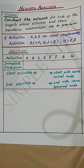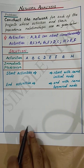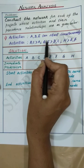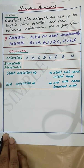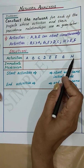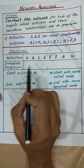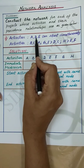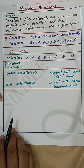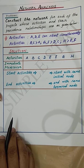Network analysis problems: construct the network for each of the projects whose activities and predecessor relationships are given. For the first problem, let us write the given predecessor relationships in tabular form. We are given activities from A to H. Activities A, D, and E can start simultaneously — that is, these activities do not have predecessors.